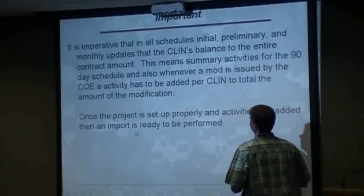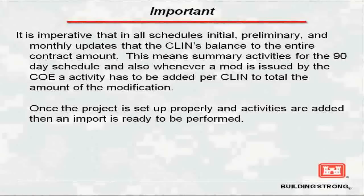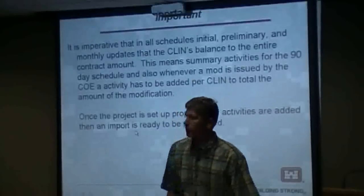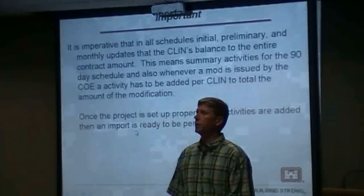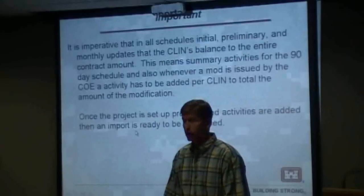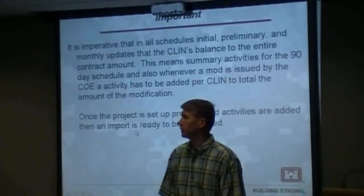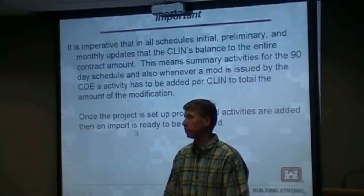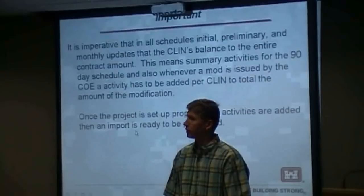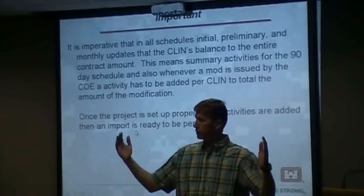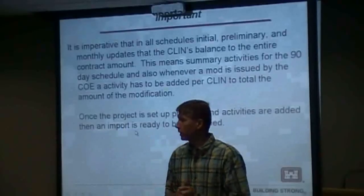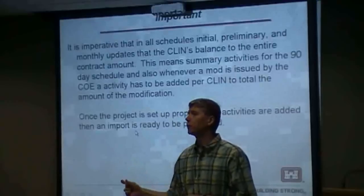It is imperative on every single schedule you ever give us — the preliminary, the initial, the monthly updates — that the plans are balanced. On your preliminary schedule, the scheduling spec says you shall turn in a schedule within 15 days of notice to proceed. We expect the first 90 days to be detailed enough that we can make payment to you. We want you to get your money as fast as possible. We want the first 90 days to be detailed, and then for the remainder of the job it's recommended — not mandatory — that you summarize the remainder by responsibility code.